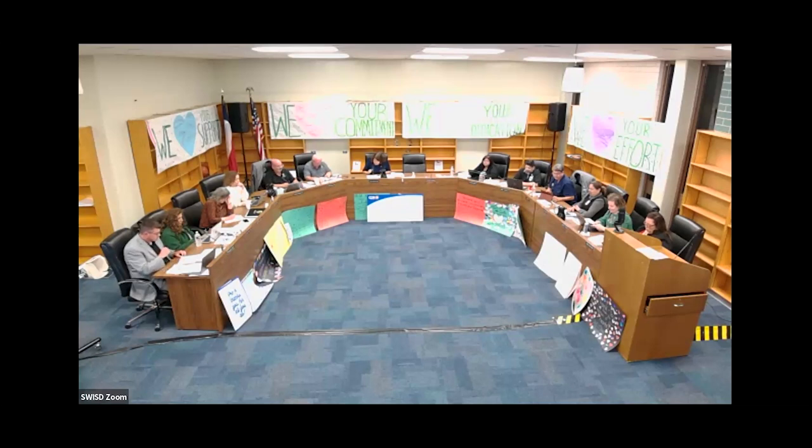Consider the award of RFQ 2425-118, Kitchen Serving Line Replacement at Sky Harbor Elementary School. Once again, we went out for bids to replace the serving lines at Sky Harbor Elementary. They were placed in there when we renovated Sky Harbor, so their life expectancies have come to an end. We received 2 bids, and we're asking the board to approve the Mission Restaurant Supply contract in the amount of $272,087 for Sky Harbor, to be funded out of the fund balance from child nutrition.